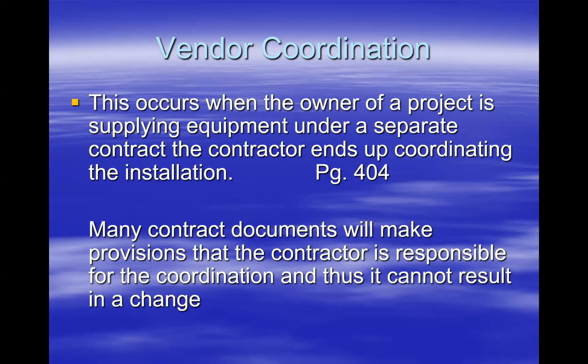I've had a few projects where the owner is responsible for both supplying and installing something, and then halfway through, they realize that they don't have the expertise, and they come back to me as the contractor saying, hey, per the contract we were supposed to supply and coordinate the installation of this, we don't want to do that anymore.